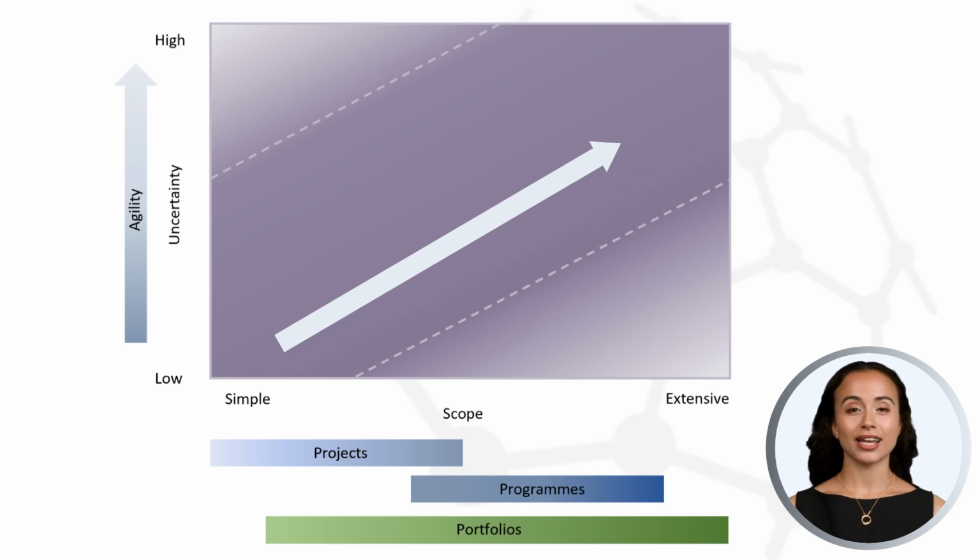The basic activities in the closure process don't change significantly with the uncertainty and scope axes of the Praxis delivery model. It is the technical nature of the work and the contractual context that have most impact on the volume and type of work that must be completed during this process. However, in high agility projects, many component products will have been delivered incrementally during the course of the delivery phase. These may have been handed over formally during delivery, leaving only the final loose ends to be tied up by the closure process.